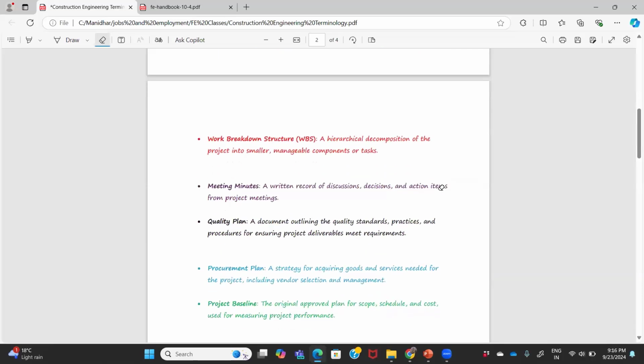Minutes of meeting. Whoever works on a site knows the minutes of meeting. Whatever meeting happens between all the parties has to be recorded on paper, or documented very sharply, in such a way that none of the parties can say that they told this thing in the past but you are not committed to it. For example, a client may say that he already informed the contractor to do a particular activity free of cost. But that's like cheating, or a fraudulent activity that may happen when money comes into the account.